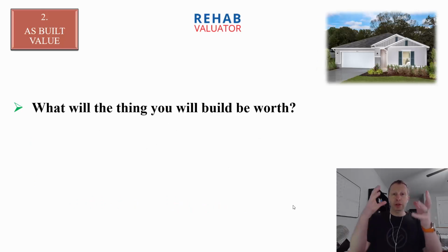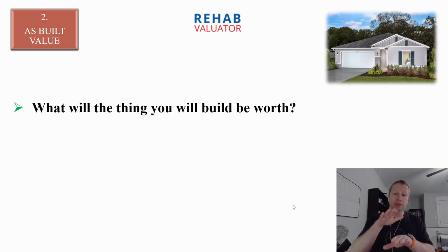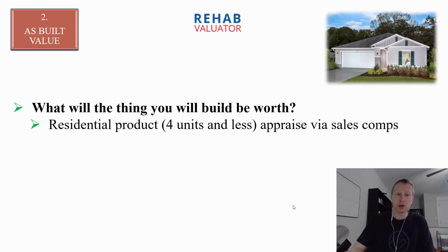Step number 2, now that we know what we're going to build, a 2,000 square foot duplex, 2 apartments, 2 bedrooms, 2 baths each. What is it going to be worth? What is the thing I'm going to build going to appraise for? So, residential product, 4 units and less, trades based on sales comps.